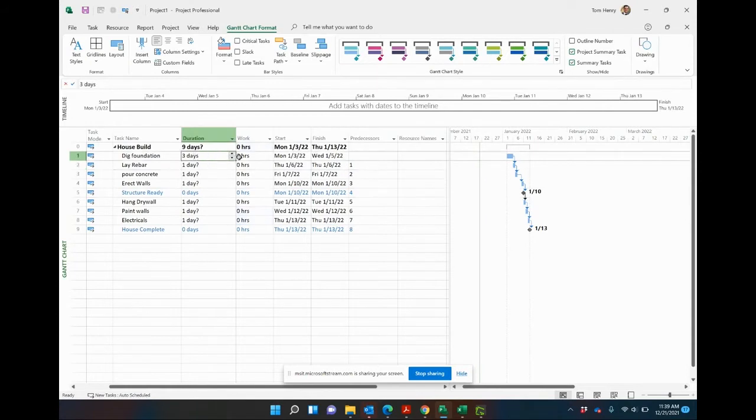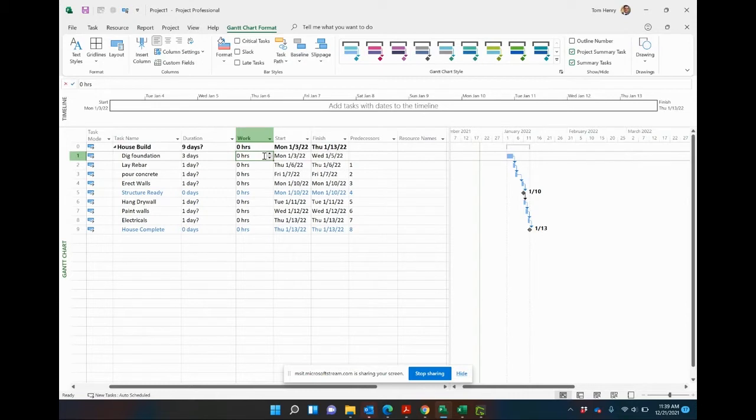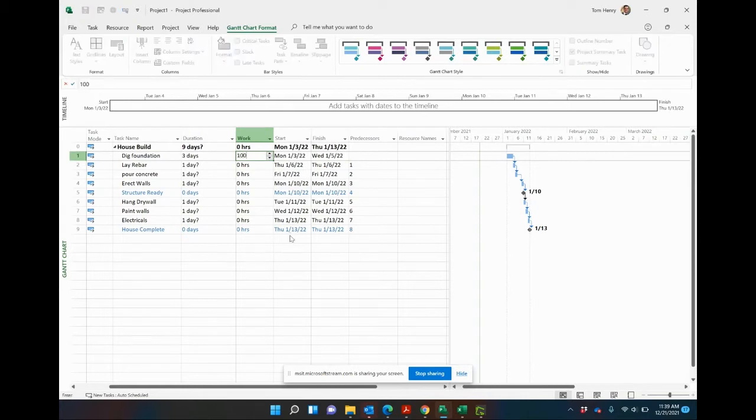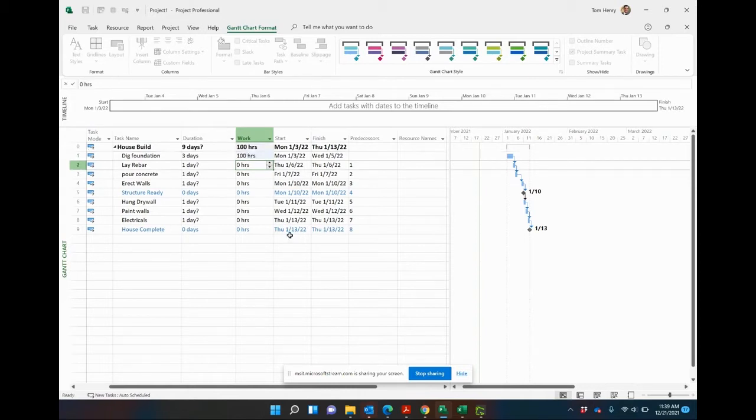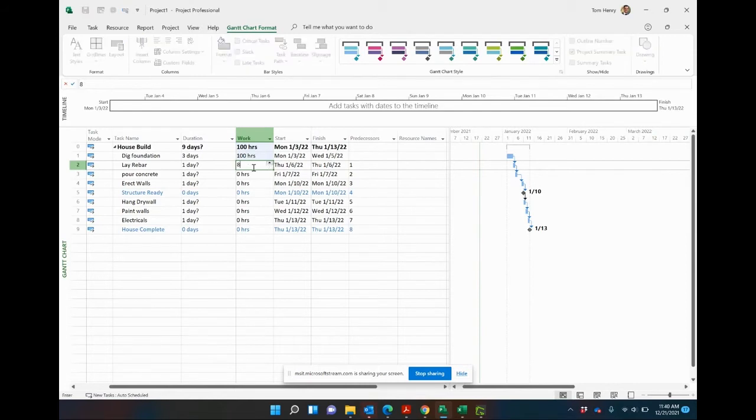Let's go and remove the resources out, so the first thing to do is estimate duration and how much work. Let's leave the resources out of it. To dig a foundation, it's generally a crew of people and it takes them 40 hours for a week, there's a crew of people, it's going to be let's say three on the crew, takes them three days. So I estimate that the effort for that is probably around 100 hours of actual labor. If we have 10 people working it they could get it done a lot quicker. So just one person it's going to take them two and a half weeks. So we come in and estimate the work at 100 hours. To lay the rebar, it's probably only about eight hours of work.